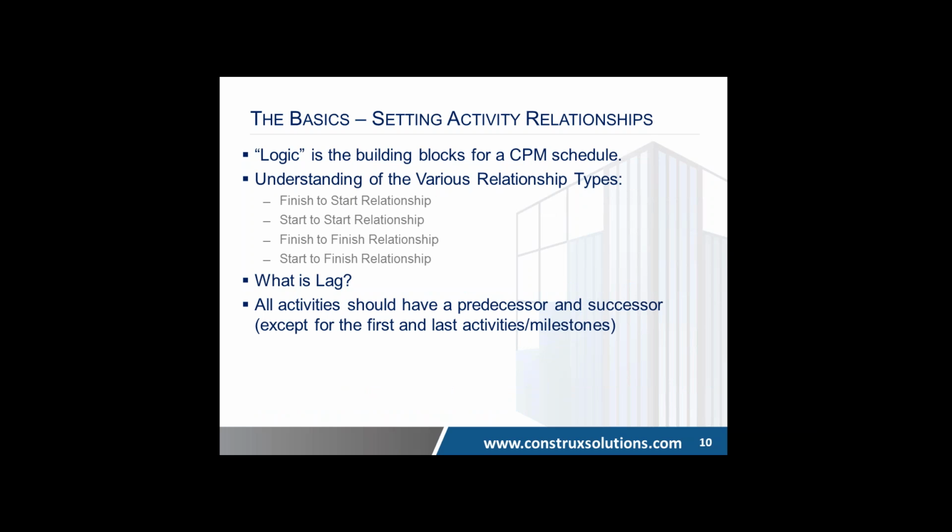Setting activity relationships. This is another way of setting up a schedule. Logic is very important. Without logic, there is no CPM schedule. It's about trade flow. It's about workflow. It's about deciding which activities come first and which ones follow suit. And there's various relationships. There's the finish-to-start relationship. There's the start-to-start relationship.